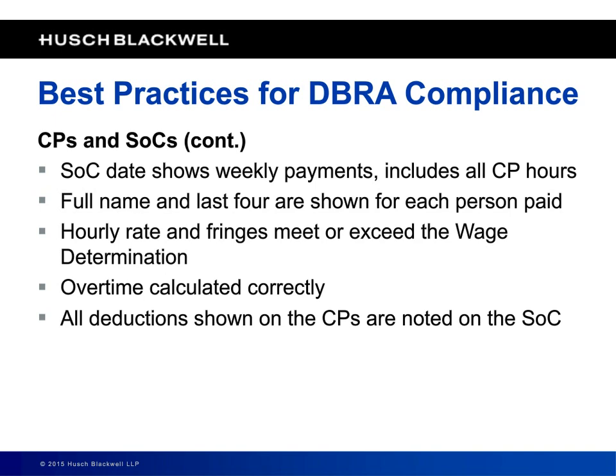You've got to go through and do those overtime calculations. Again, it's not calculated on a daily basis. It's those hours over 40 during a work week for which employees are entitled to time and a half. And that all deductions that are not authorized by statute, like deductions for taxes, are noted. So if you have a 401k or a health care program that they're paying into, that a deduction is taken out of their pay for that shows up in the statement of compliance.